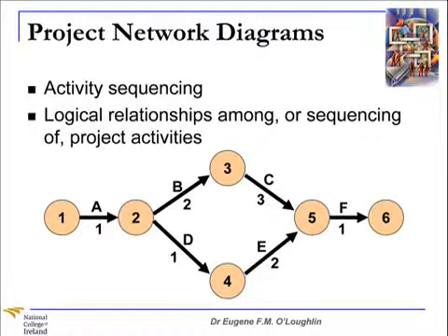So when should you use a project network diagram? Well, they're very useful tools when you are planning a new process or if you're involved in improving an existing process. For new processes, you will have to determine the logical sequence of activities for any solution that you propose. And we do this because activities often cause scheduling problems on projects. For example, if you have 2 activities requiring the same resource, they cannot be completed at the same time.